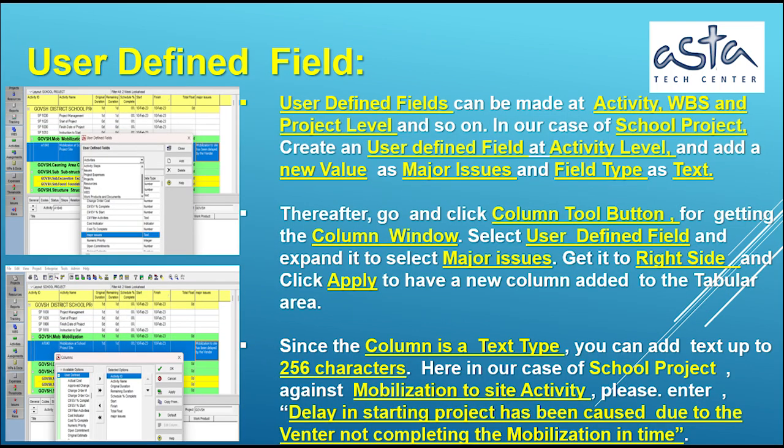User-defined fields can be made at activity, WBS and project level and so on. In our case of the school project, create a user-defined field at activity level, and add a new value as major issues and field type as text.